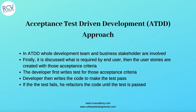Once the acceptance criteria is defined and test cases are derived from it, the developer writes code to make those test cases pass. The developer refactors the code until all the test cases defined for the acceptance criteria pass, continuing until the last test case is passed. This is the overall Acceptance Test Driven Development approach.